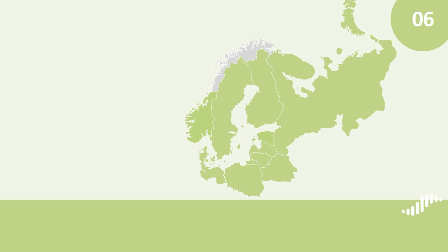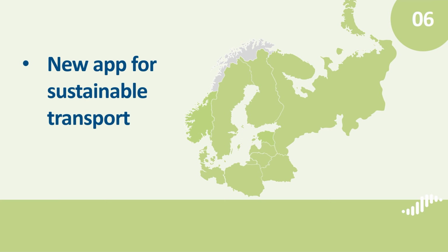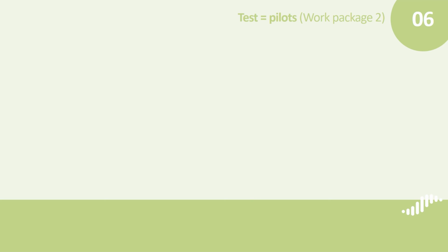Testing the same component of the solution in several locations is counted as one pilot. For example, if you test a new app for sustainable transport separately in Lithuania, Denmark, and Poland, it is one pilot since you test the same app. But do not forget that in this case, the partners from these 3 countries need to prepare the pilot together and to evaluate it together.